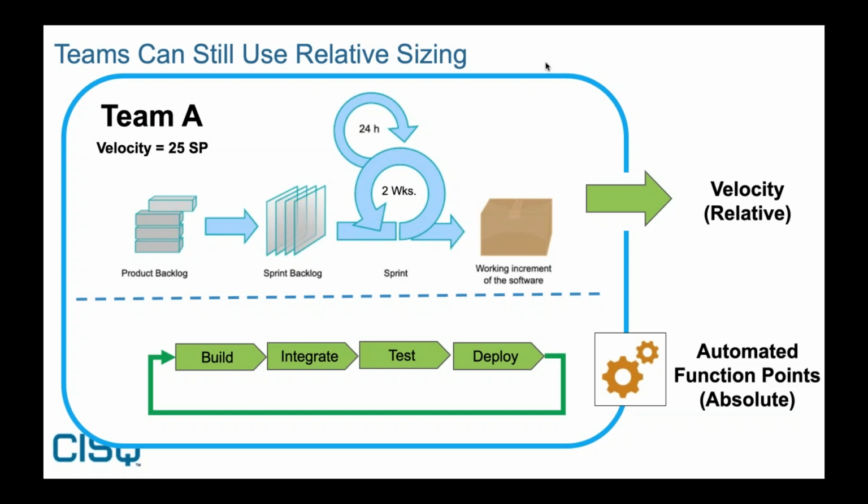So you can have a team, I'll give you one example, where the team was using tiger points. That sounds a little bit strange, but what they had decided to do was they used endangered species. So one team was using tiger points, another team was using panda points. The reason being, you can't compare tigers and pandas. They had done this deliberately to get management to understand, saying to the team, hey, team A is doing 25 story points and team B is doing 40.